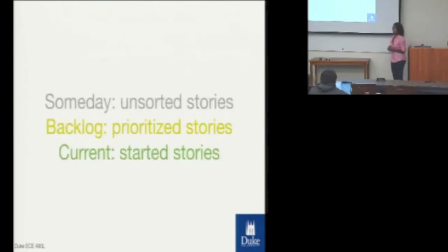So the other thing I want to mention about this queue is, obviously it's unsorted, so you don't have to sit here and prioritize the someday queue, right? Because it's someday. We'll worry about that when that happens. But what you're going to want to prioritize are the things in backlog. And the reason you're going to want to prioritize them is because once someone's finished what they're working on in current, then they're going to pull something off of backlog. This is also a great way to once again become asynchronous, where you don't have people sitting there twiddling their thumbs like, oh, I don't know what to do next. You're like, did you go look in backlog? Right? It kind of keeps people's coffers full, not saying they have to work endlessly, but it makes it a lot easier to figure out what needs to happen next.